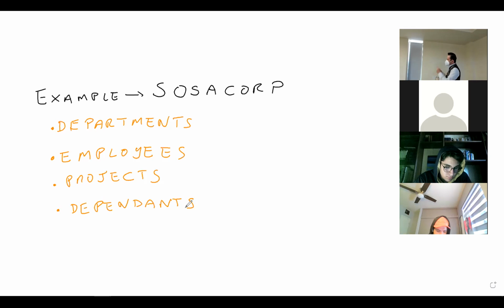She has to log onto her computer and say, I was working on these 3 projects, so I have to indicate how many hours I worked on each project. Why do you think that is? Because the projects have budgets and the budgets pay those hours, okay? So there's a lot of systems out there that help organizations keep track of work.